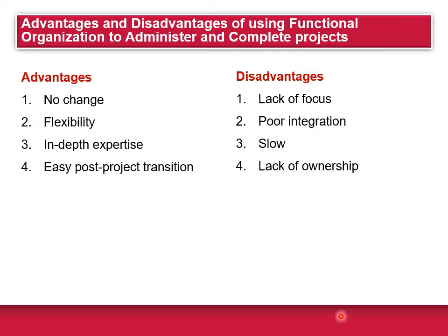What are the advantages? Well, there's no change. The projects are completed within the basic structure of the parent organization, so there's no radical alteration in the operation of the organization. There's also a lot of flexibility in the use of staff. Appropriate specialists in different functional areas can temporarily be assigned to work on the project, and then they return to their normal work. With a broad base of technical personnel available within each functional department, people can be switched among different projects with relative ease.